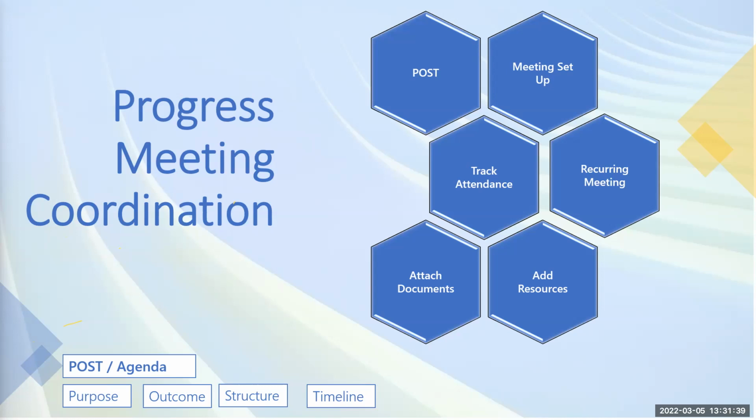There isn't one size fits all, but the key regular ones that are common to every project or program are your RAID management, your change management, your SteerCo or progress update meeting. Those ones are very key because you need to provide a regular update on how the project is progressing. Every 2 weeks, every week, every month is dependent on the organization and what has been written in their governance framework.